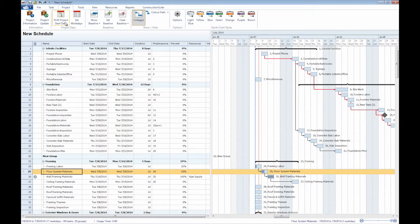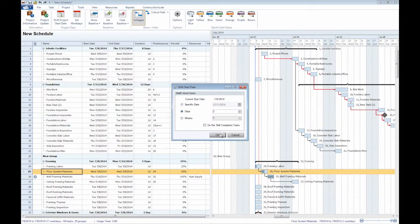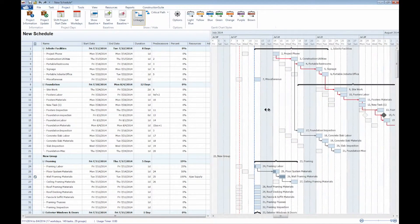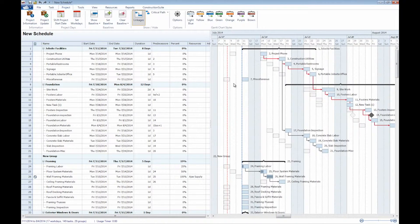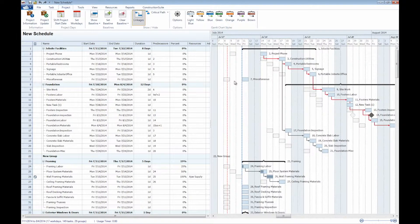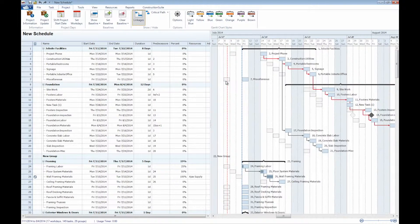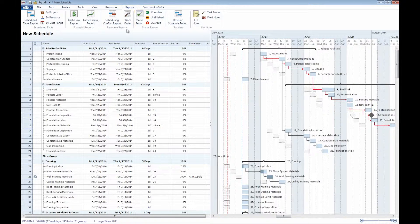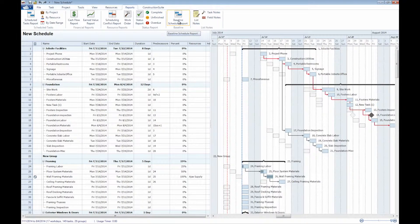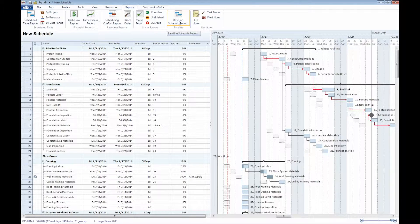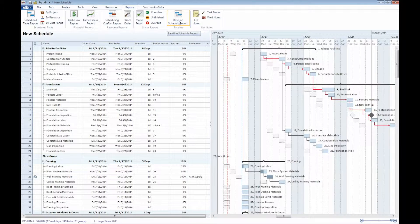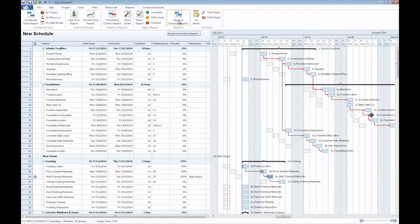Then, if our project were to shift up, say, three days, we then would be able to go back and notice where our original baseline occurred, saying that all these tasks were to take place in the area denoted by the gray shaded box, or the gray outline of a box. And we can see how that relates to where our task currently stands, and then, at which point, after generating a baseline schedule report, we can actually see specifically what our variance was as far as the original start date, and what we actually ended up doing by the end of the project. This is going to allow you to really kind of keep track of the full status of the schedule, making sure that everybody just kept up to speed as far as the status of the project, keeping everybody on the same page.